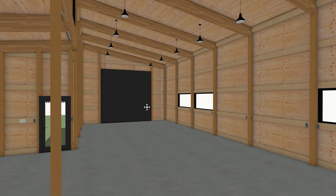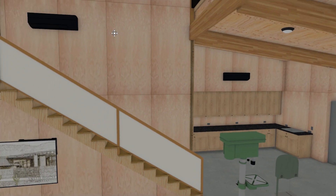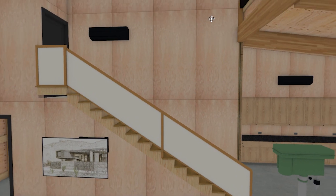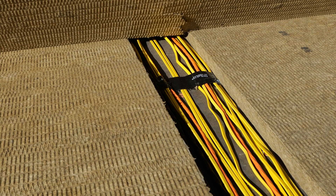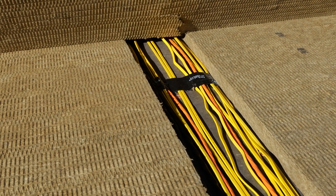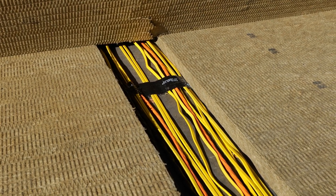That's really cool, but there are a couple of challenges. Number one was making the chases from one side to the other. We have an electrical room up here where a lot of this stuff goes from the inside high bay to the low bay roof. We're actually transferring from this electrical room outside on this wall — this is where everything comes from inside to outside, unless it goes up through the ceiling. We can only do the ceiling where we have the lights, because we didn't want a big wad of cables running through the ceiling.